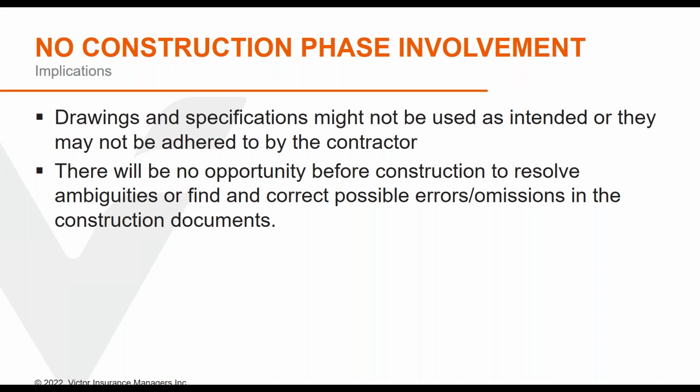Obviously, correcting problems on paper is much cheaper, faster, and easier than correcting them in the field. And the less involvement you have to actually understand what's going on, the greater the chance that there will have to be field corrections that could be more costly. And you just simply don't have that chance to mitigate the effects of any problems with the construction documents.